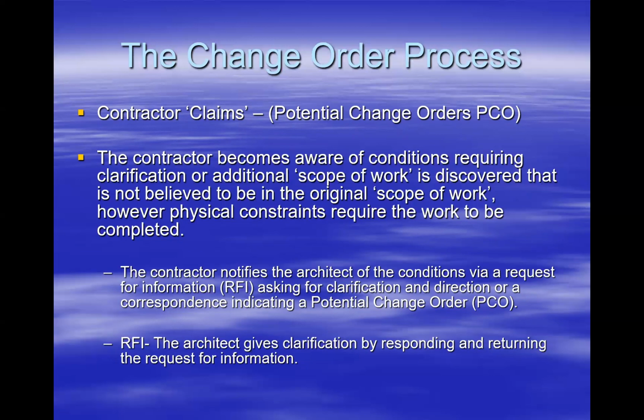However, the physical constraints require that work to be completed. So I always erred on the side of caution. We would always document. We would create a PCO, potential change order. We actually called them a CCI, which was a change in condition. There's some different terminology out there. Over the years, with my experience with contractors, the potential change order, PCO, is the term that I've seen gain the most momentum out there.